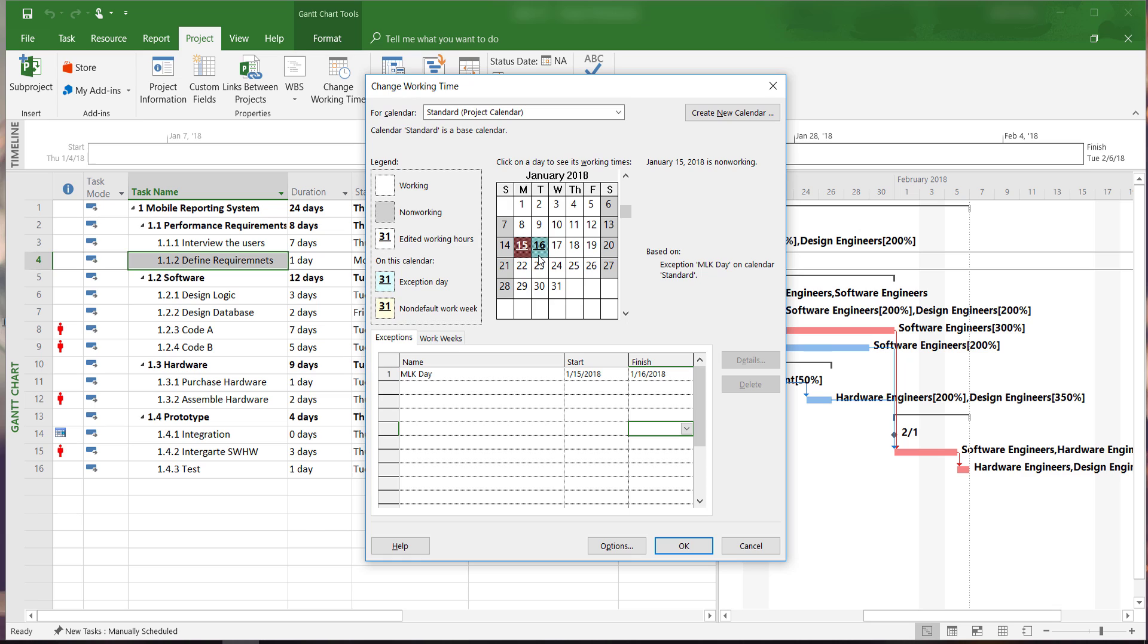If we have more holidays, we can follow the same procedure and enter them all here for the rest of our project. If our project lasts for more than one year, we need to enter these holidays for each year.